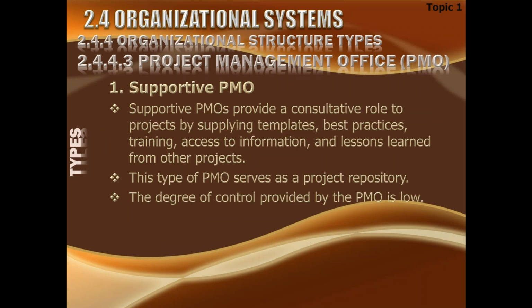A supportive PMO provides a consultative role to projects by supplying templates, best practices, training, access to the information, and lessons learned from other projects. This type of PMO serves as a project repository. The degree of control provided by the PMO is very low.